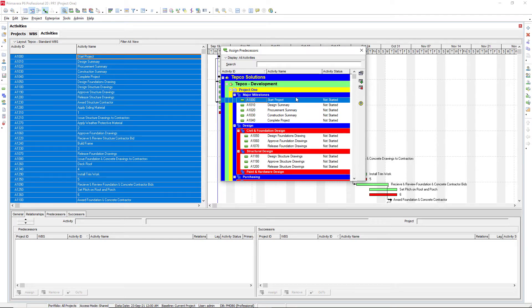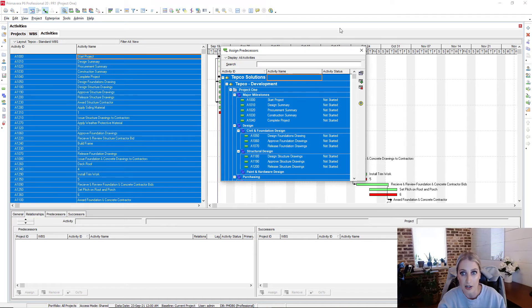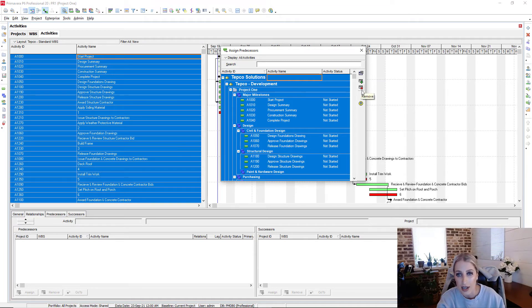We could select Ctrl A, and then we could remove those relationships. And so once we select Ctrl A, we have everything in there, we could click on this red X to remove the relationships.